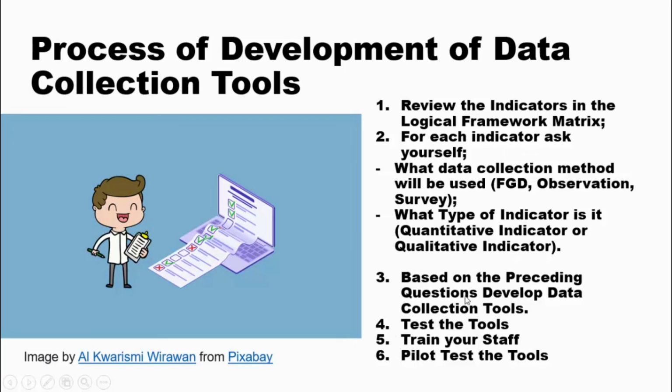After you've developed the tools, you test the tools. You as the developer have to test the tool to see whether it is answering all the questions that are up there. Then, if the tools have passed your test, you have to train your staff.